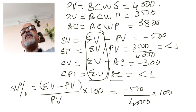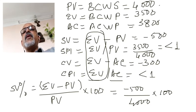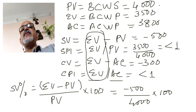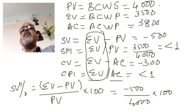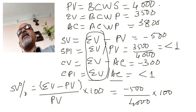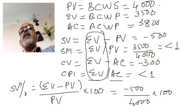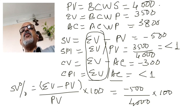A project's health is perfect if SPI ≥ 1 and CPI ≥ 1, meaning the project is on target and within budget. This is why professional project management is much easier than ad hoc project management — we need not track 200 reports; all we need are two numbers at our fingertips: SPI and CPI. With good team, risk management, and stakeholder management, the project will progress.